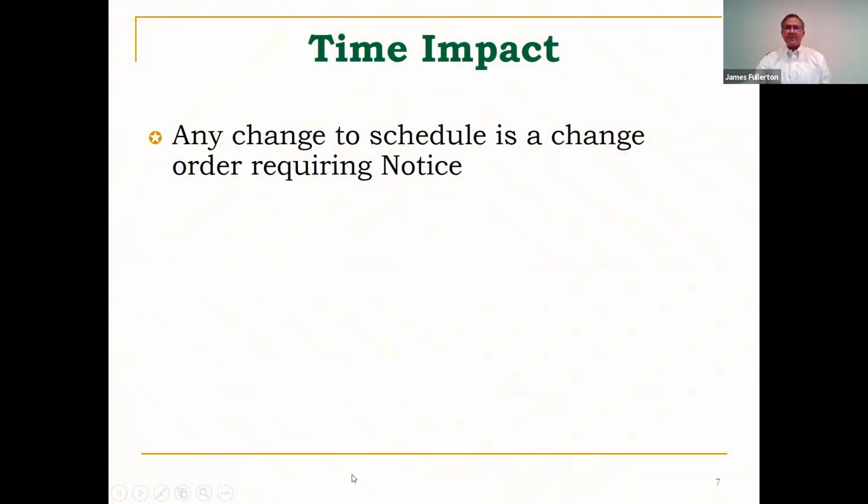I also want to emphasize that any change to the schedule is a change order requiring notice. There are at least two parts to every change order. One is the change in scope. The other is the impact on the schedule.